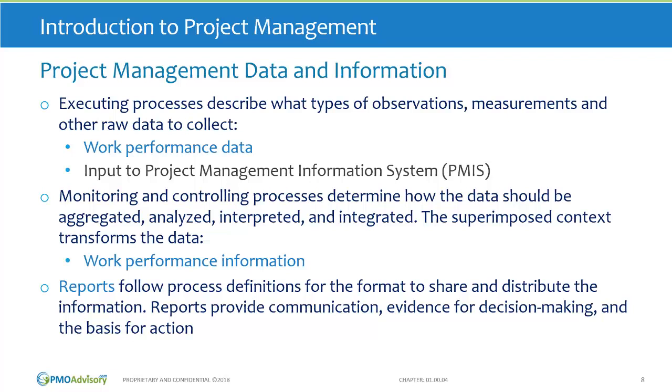The work performance data is fed into the monitoring and controlling processes. Here you're adding more techniques to combine, analyze, and interpret the raw data. This gives an overview, shows patterns and trends, and a context so that now you have work performance information.